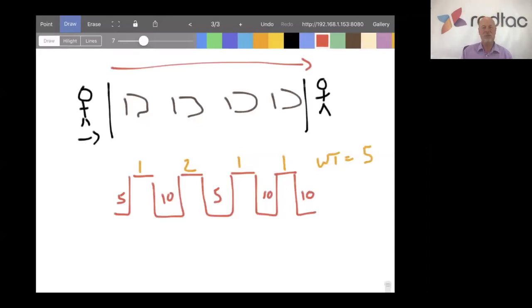So your work time is 5 days. But in this scenario, one of the wastes of lean is what's called wait time, and what causes wait time a lot is the wrong level of empowerment. So we're having to wait a lot. In this situation, this waste, one of the 7 wastes, wait time, means that the work time is 5 days, but the lead time is 5 plus 1, 6, plus 10, 16, plus 2, 18, plus 5, 23, 24, 34, 35, 45. The lead time is 45 days. That's insane. That's not unusual.